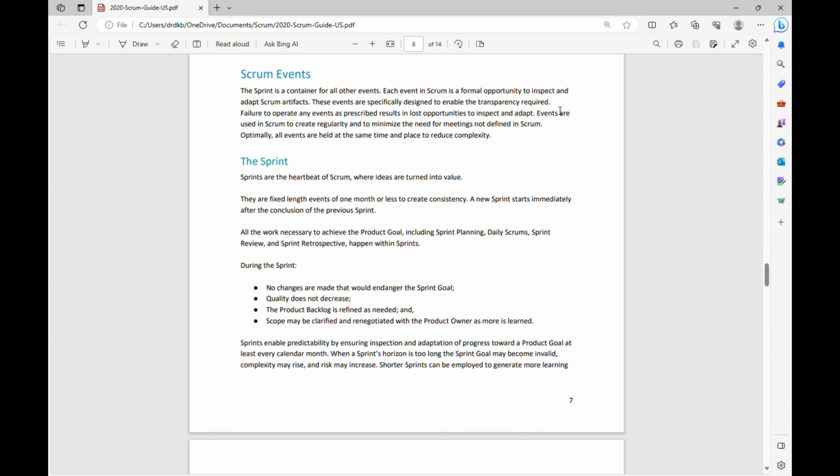Now similarly, during the sprint review, the team will showcase the work that they have completed, or the product increment, to the stakeholders, and the stakeholders will inspect that product increment during the sprint review and provide their feedback. So based upon the stakeholder or customer feedback, the team will make the changes or adapt, adjusting the product increment as required, and they will work on it in future sprints. So here again, the product increment is being made transparent to the business users or the stakeholders, the stakeholders are inspecting it, and the team is adapting to the changes. So that's how these events are giving the team the opportunity to inspect, adapt, and be transparent.